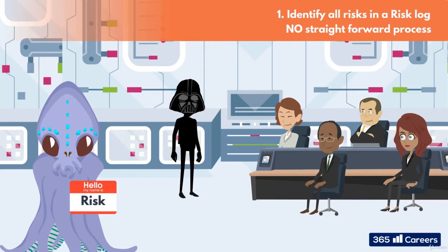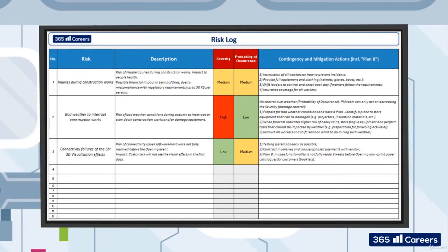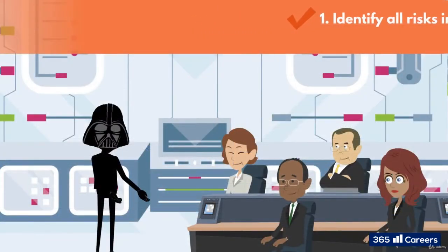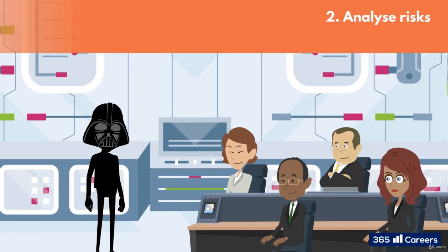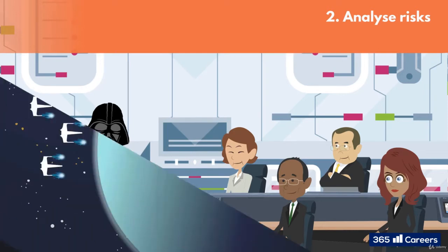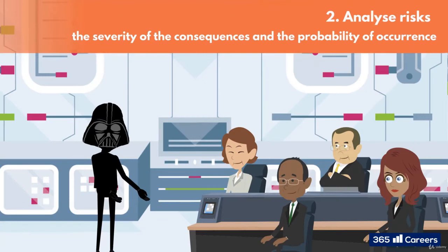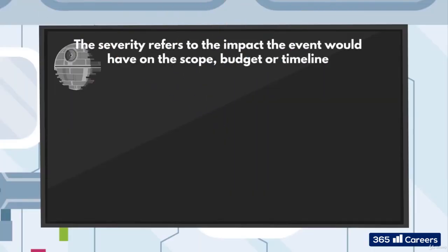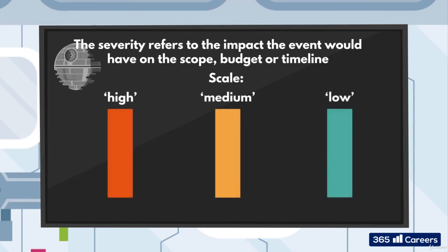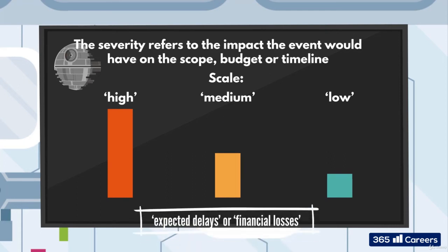The risk log will look something like this. Now once the risks have been identified, the next step is to analyse them. We can do this by reviewing two dimensions: how bad can it get if the event happens, and how likely is it that the event actually happens? In other words, the severity of the consequences and the probability of occurrence. The severity refers to the impact the event would have on the scope, budget or timeline, and to what degree the project activities are exposed to such an event. We record the severity with a scale — a simple one would be high, medium and low, but could be translated to something as specific as expected delays or financial losses.